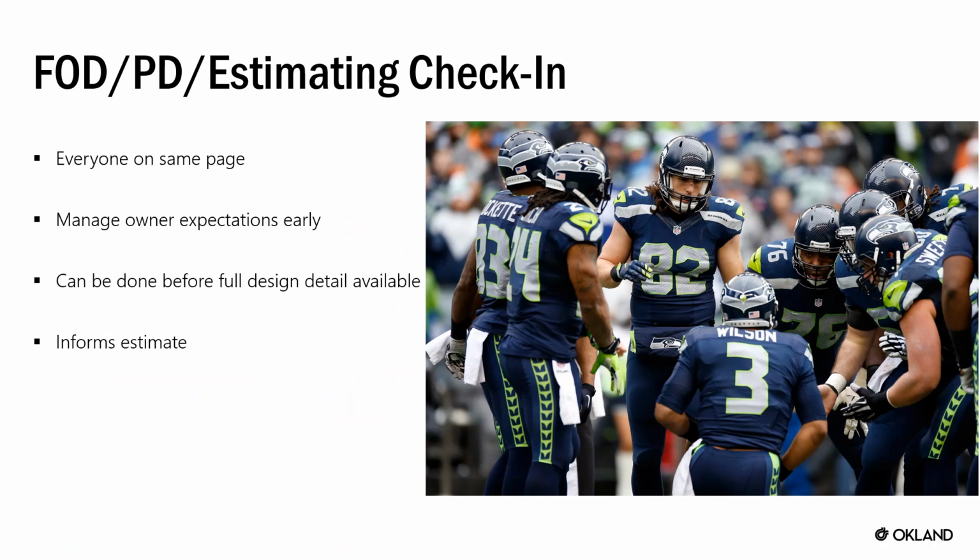At the end of the SD phase, a really important thing to do is to be a leader and make sure you show your tact schedule and your assumptions and everything to field ops directors, project directors, and especially those in estimating, pre-con directors who are negotiating the amount of time that this project will take with the owner. It's a lot easier to set the deal with a realistic timeline in this phase than it is later. And your tact schedule is a major part of that. You want to get all of these parties to buy off on the tact schedule and then move forward.